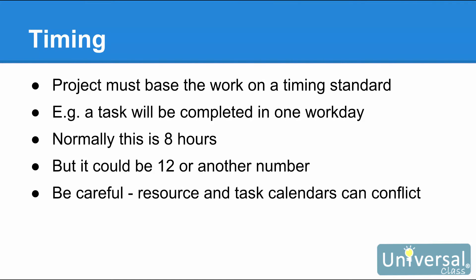Whenever you create tasks and assign resources to them, as we'll learn later in this course, Project must base that work on a timing standard. For example, a work day, night shift, a week, and so on. An example is this: if you tell Project that a task will be completed in one work day, Project knows that a work day typically means 8 hours. It can also be 12, or however many number of hours that you set up in your calendar.